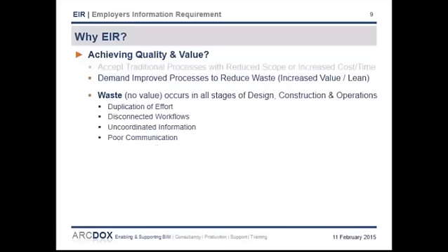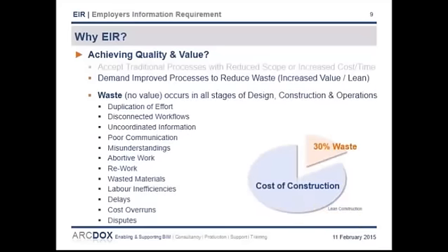And waste occurs at all stages in the design, construction, and operations. And none of these things that are listed here add any value to your project. Some industry groups would suggest that over 30% of the cost of design and construction is waste. So as a client, you really have to ask yourself, do you want to pay for that waste, or would you prefer to convert some of that into achieving more value? And this is really why, as a client, you need to require a better information process that will help drive out waste and deliver value for your projects.